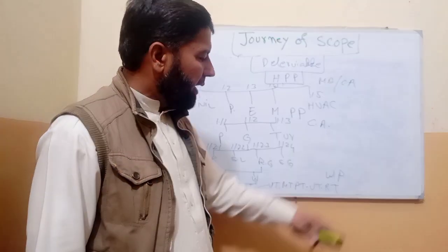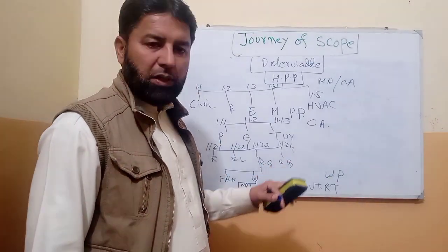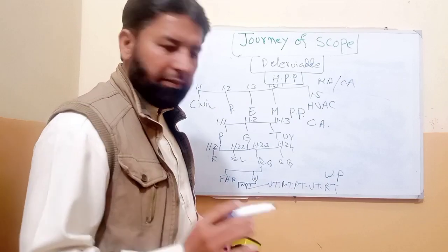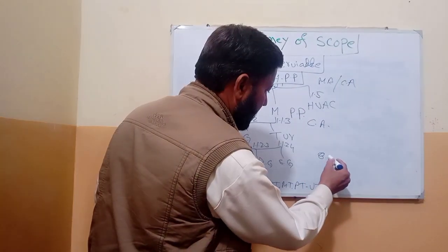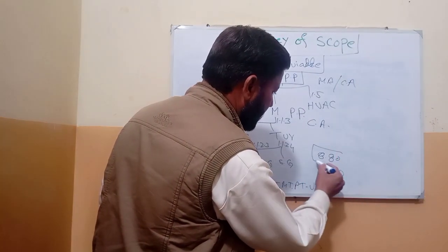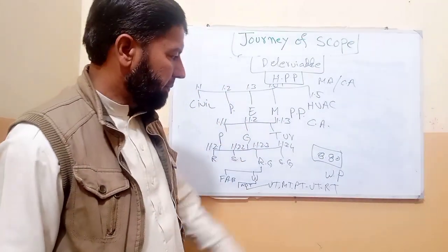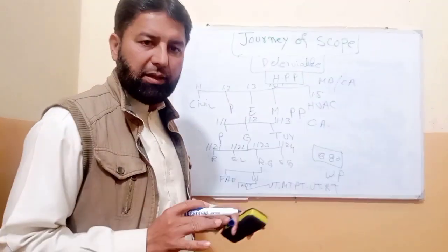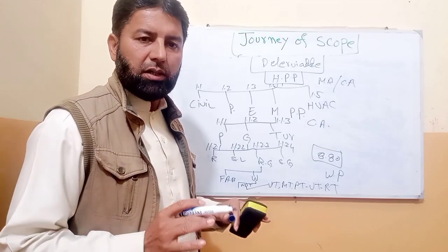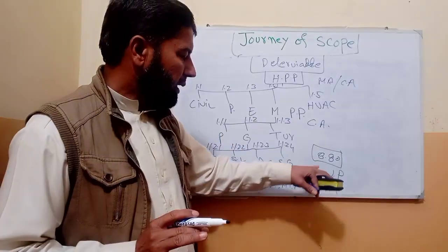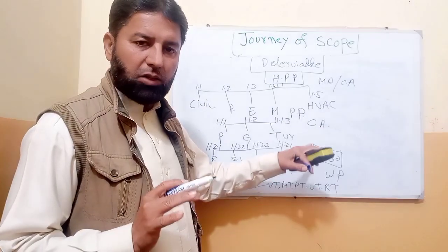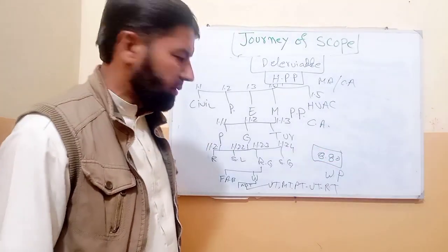And the thumb rule of a planning package is that effort should not be less than 8 hours and should not be more than 80 hours.